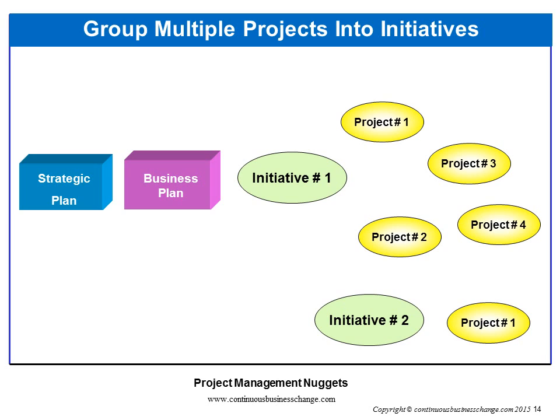Align projects within initiatives, and then link the initiatives to the organization's strategies and goals. Now prioritize the initiatives and projects, and stop or delay the ones that are less important. If you're not following a process for commissioning projects, you will typically be attempting to do more than is possible.